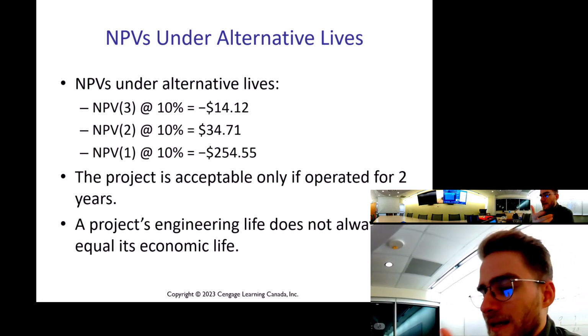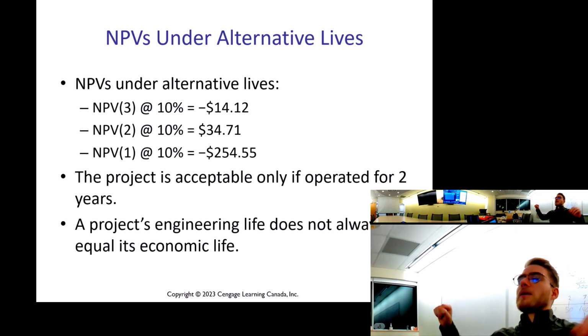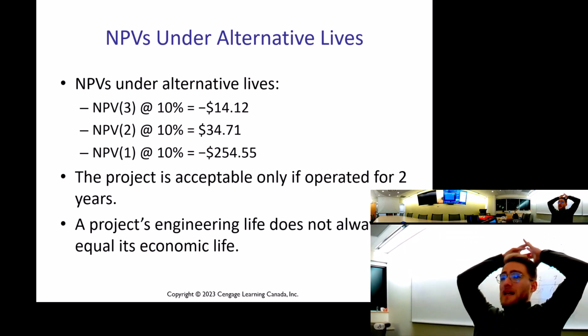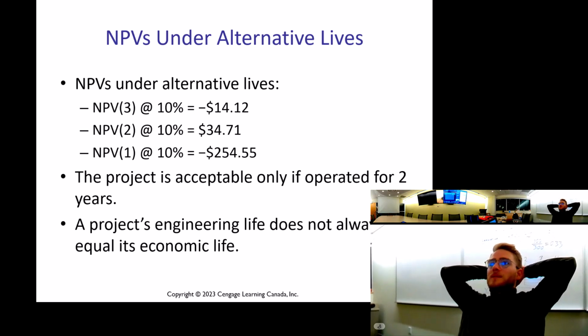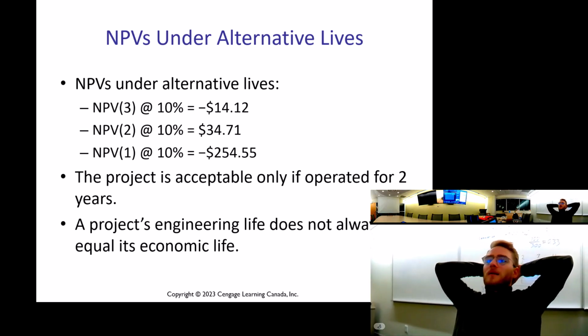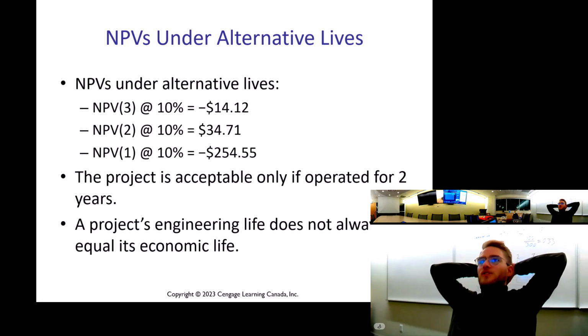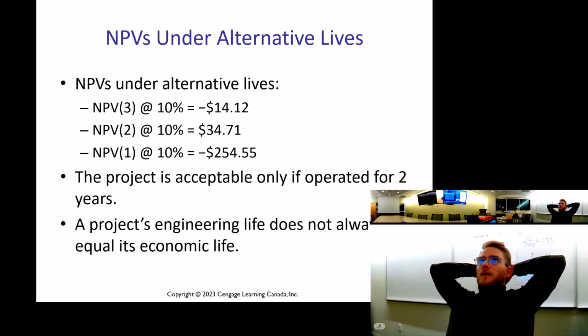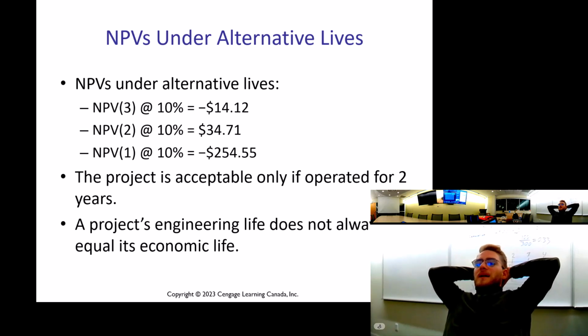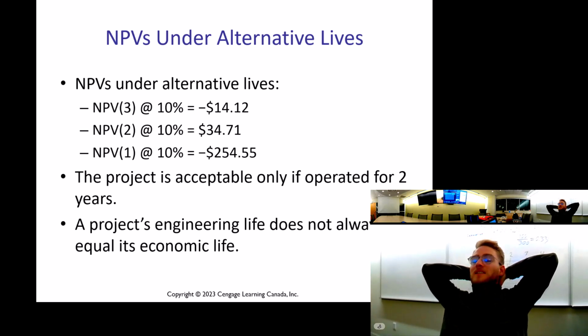This is kind of what a net present value profile might look like on projects with varying lives. It doesn't always make sense to buy equipment and run it down until it's worth nothing. Sometimes you buy it and sell it at the point where you maximize your cash flows, and also maximize the salvage value, aka your sales price, to maximize the value of the project to the firm.